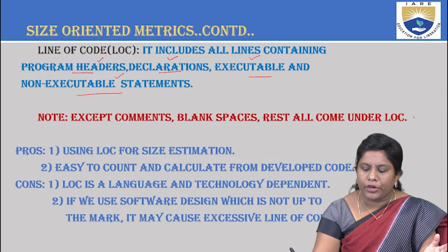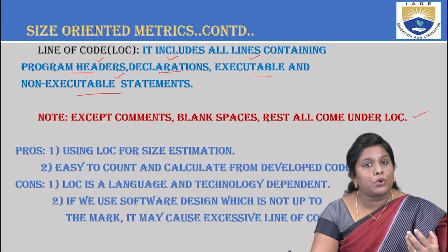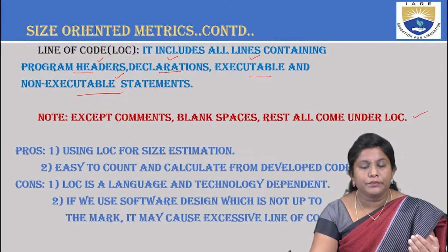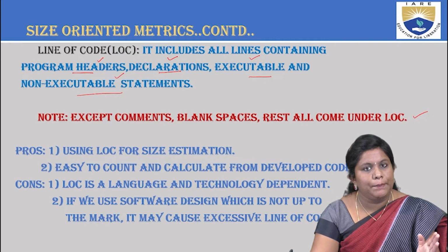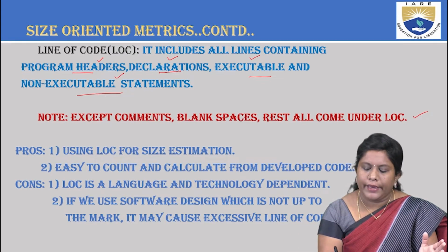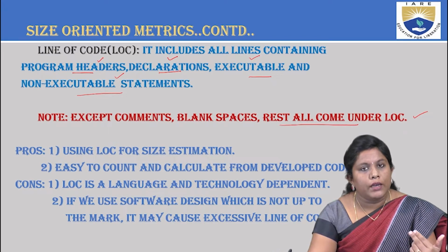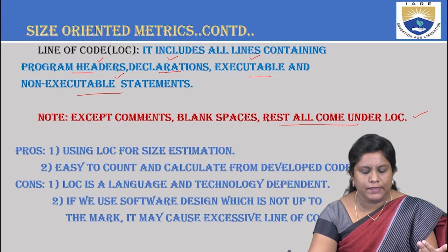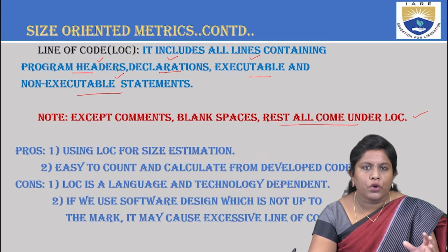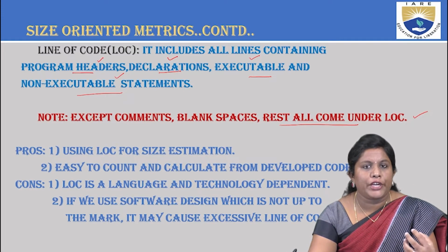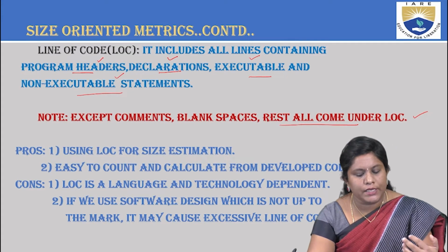And this is a very important point: you are not supposed to count the comments and the blank spaces as lines of code. And when you are trying to calculate the cost estimation, you have some advantages and disadvantages along with it.